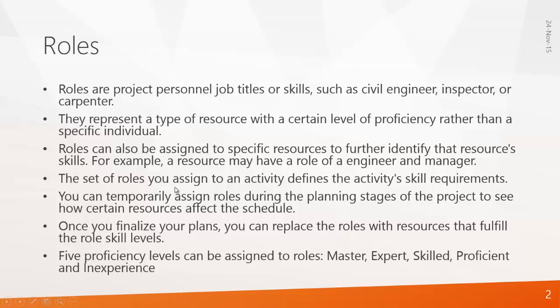The set of roles you assign to an activity defines the activity's skill requirement. You can temporarily assign roles during the planning stages of the project to see how certain resources affect the schedule. Once you finalize your plans, you can replace the roles with resources that fulfill the role skill levels.